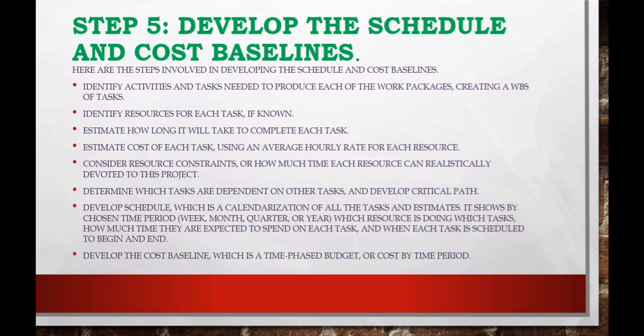Step 5. Develop the schedule and cost baseline. Here are the steps involved in developing the schedule and cost baseline. Identify activities and tasks needed to produce each of the work packages, creating a web of tasks. Identify resources for each task. Estimate how long it will take to complete each task.